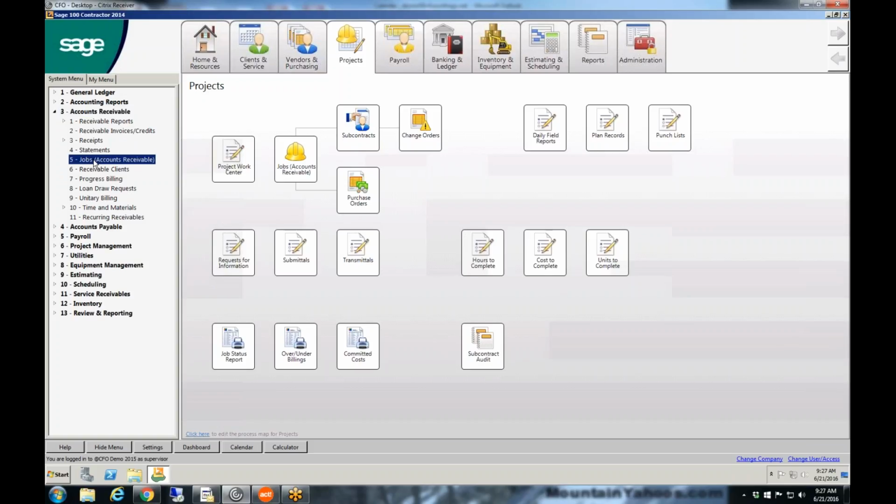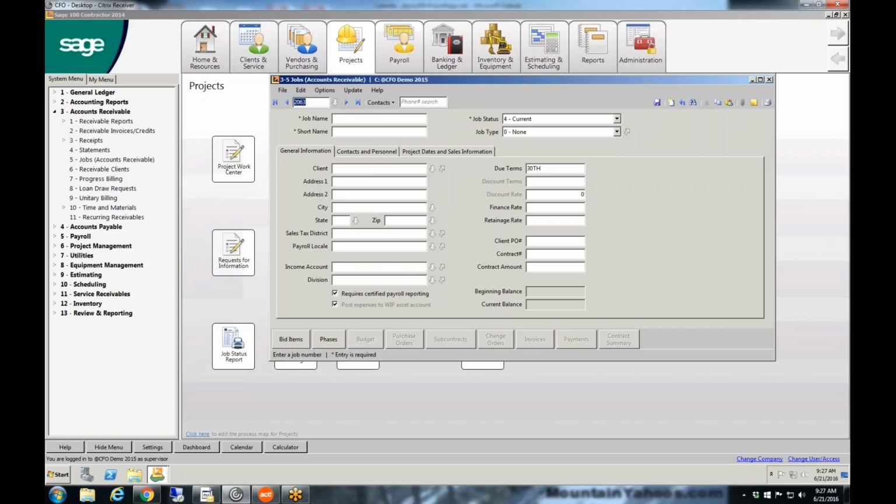What we do are hotels. So when we are doing a ground-up hotel construction, once construction is essentially complete, we still have 3 or 4 months while we're prepping the space for completion. That will include some hard asset acquisitions, like raw furniture type of stuff that we're putting in, and tracking different expenses that go into the pre-opening element, and we're setting up computer systems and things of that nature. So is there a way to break out some of those phasing elements in Sage?